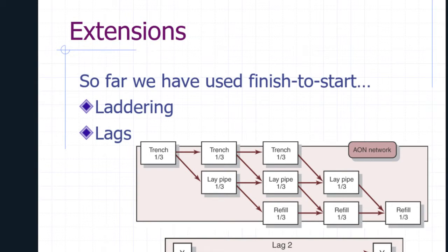So you can see how we can actually shorten the time of a project. We don't have to dig the trench, lay the pipe, fill the trench. We can actually split it up to enable us to complete it more efficiently. And then at the bottom, what we've got is the idea of a lag between two activities.